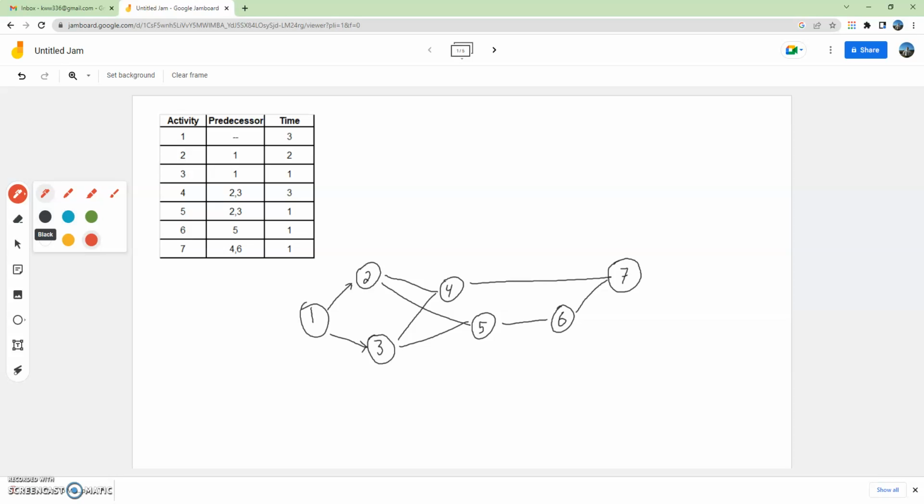So basically each of the activities has a certain activity number, and then we're going to go with the earliest start, upper left corner, earliest finish, and then we just want to switch colors to emphasize this. So we go backwards to latest finish, and then the latest start time. So that's what we're going to do. This way will enable us to determine the project time, and then as we go backwards to fill in the latest start and finish times, we can establish the critical path.